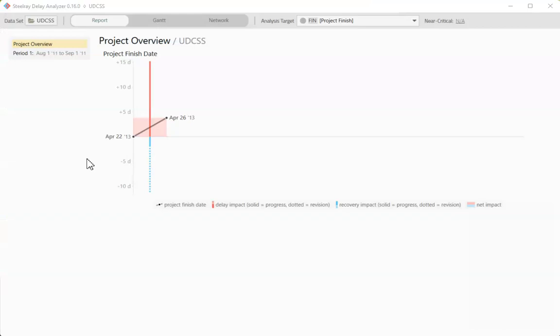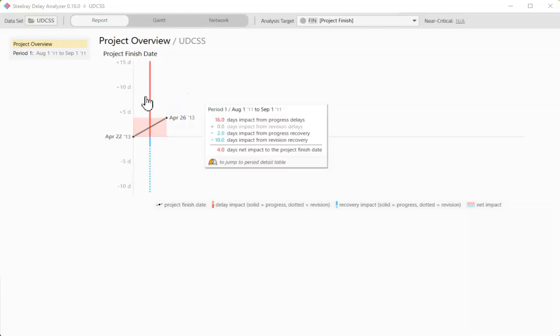On the overview report, we can see the delay as represented by the black line and the pink bar. But Delay Analyzer breaks it down for you to tell a more complete story. The solid red line shows that there were 16 calendar days of progress delays offset by 2 days of progress recovery, that's the solid blue line, and 10 days of recovery from schedule revisions.